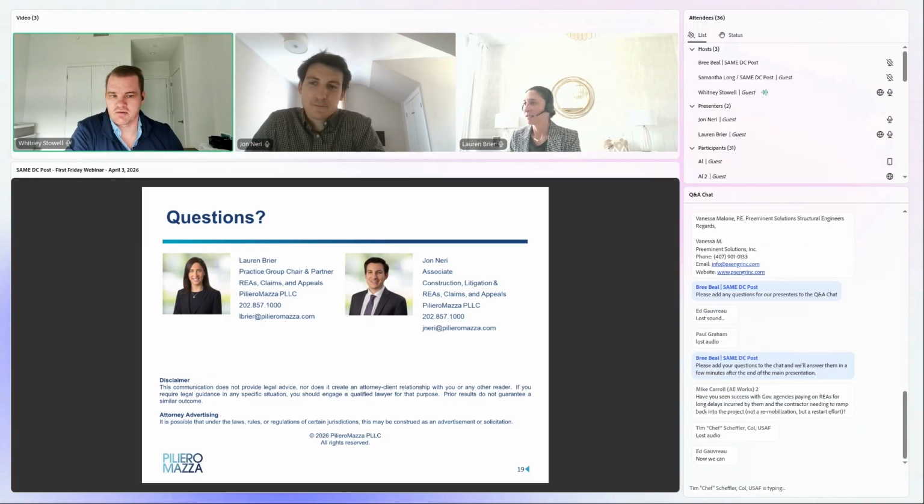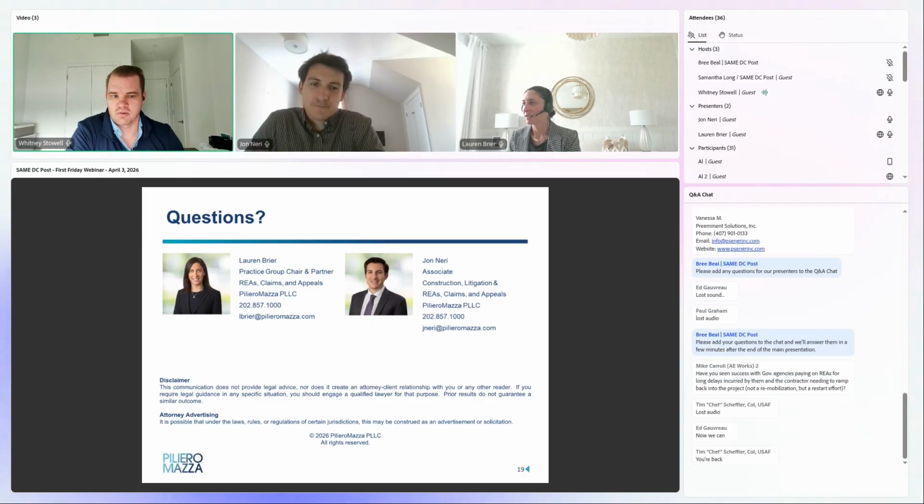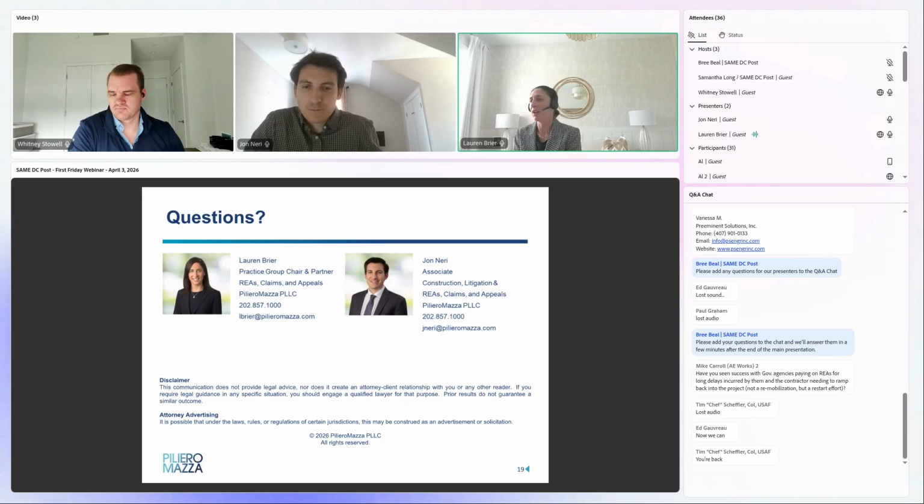Okay, so in your experience, how successful are contractors at receiving equitable adjustments following an REA? Sure. So the level of success is driven by support. When we have clients that come to us saying, we submitted an REA, we haven't received a response, or the government's not agreeing to negotiate, the biggest problem that we see is the evidentiary support. Sometimes we'll get a one-page document from a client that they submitted. There's not any argument as to why or request for entitlement. It's really just here are our costs and asking for them to get paid. So what we do from there is we help beef up that submission.